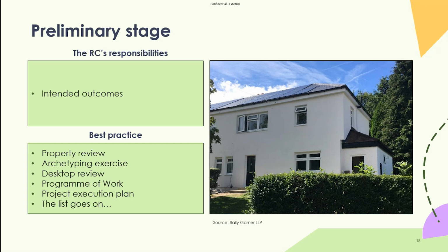One thing that I really like to do is complete an initial property assessment and review. So when you get the initial and the expected Excel sheets with rows and rows of property addresses, actually it's such a useful spent time to complete a desktop review. Again, the client may have good asset data, the client may not have good asset data, but even just simply putting yourself down on Google Maps and reviewing those properties can have a massive benefit at a later stage.